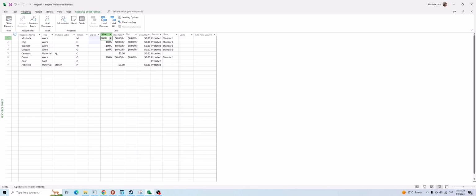Okay. If the working hours per day for you is 8 hours, 100% of Mustafa is 8 hours. It means 8 hours of availability of this resource daily.